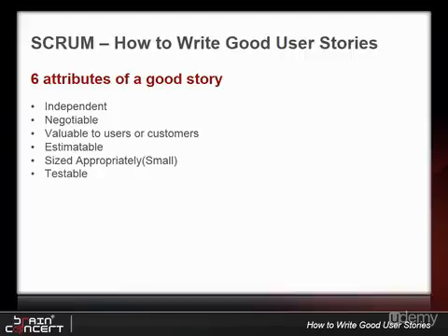As much as possible, care should be taken to avoid introducing dependencies between stories. Dependencies between stories lead to prioritization and planning problems. For example, suppose the customer has selected as high priority a story that is dependent on a story that is a low priority. Dependencies between stories can also make estimation much harder than it needs to be.